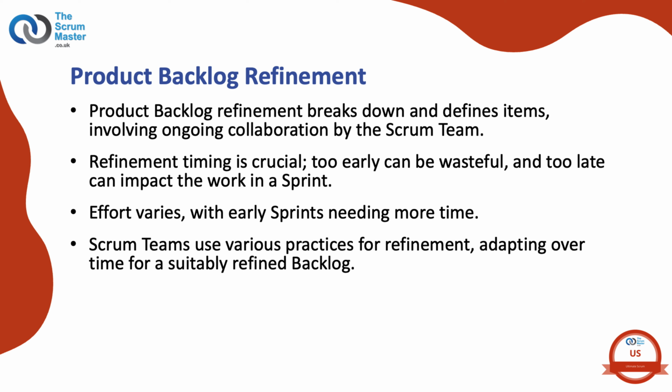If a Scrum team cannot successfully refine a product backlog item due to insufficient knowledge, some work may be required to learn more about the item. This work is often called a spike. A spike is a good practice learning activity designed to deepen our understanding of a product backlog item. The spike may be added to the product backlog, and work completed against it to increase the Scrum team's understanding of work before full work occurs in a later sprint.